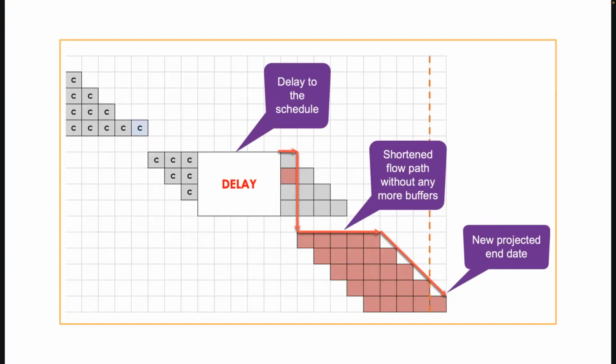If I'm an owner and I'm talking to my contractor, I can literally look at the delay, validate the delay, look at the sequences, validate the sequence, look at the interdependence ties, validate the ties, and look at any of the speeds that our trains are going, or the line of balance, or the realized flow potential percentage, and say, yes, that's within the proper ranges.